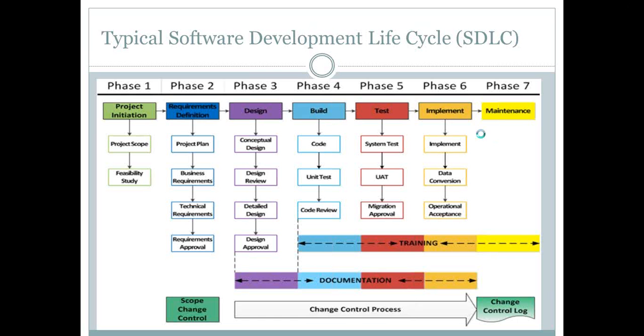So the simplest of it is the waterfall model. You would use it when the requirements are crystal clear, right? So there is very little chance of the requirements changing during the course of the project. The timelines are not too long, like maybe it's a 6-month project, and it's a simple project, and the risks involved are limited.